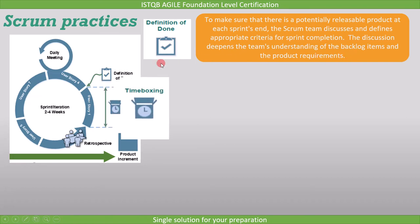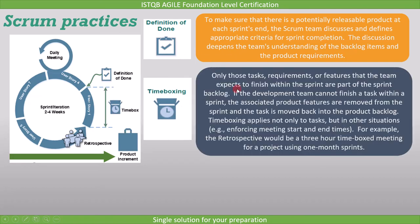Next is Time Boxing. Only those tasks, requirements, or features that the team expects to finish within the sprint are part of the sprint backlog. If the development team cannot finish a task within a sprint, the associated product features are removed from the sprint and the task is moved back into the product backlog.